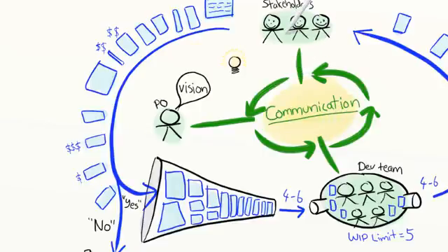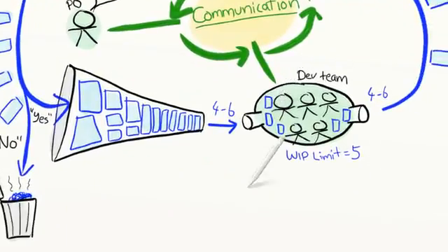Pat continuously talks to stakeholders to find out what they value. And she continuously talks to the team to find out what they think is big or small in terms of implementation effort. These are relative guesses, not absolute numbers. I don't know what this apple weighs, or that strawberry, but I'm pretty sure that the apple weighs at least 5 times as much, and that the strawberry tastes better, to me at least. And that's all Pat needs to know in order to prioritize the backlog. It's pretty cool that way.